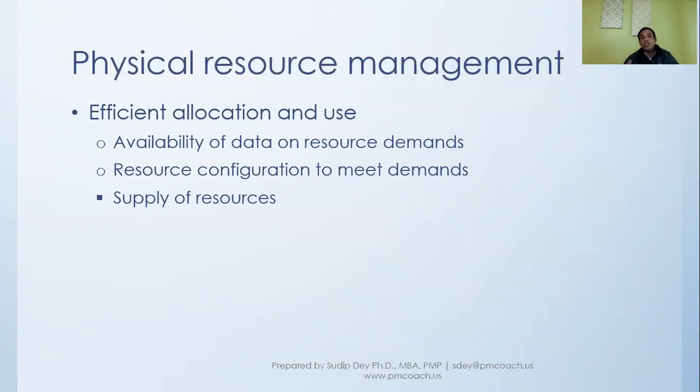And so as project manager, we are getting these physical resources. We want to plan it properly so that when it comes to testing, this environment is there for the test. Because if it isn't, then the project will get delayed, the project will suffer. So the resources should be available in time. And also in many other projects, like construction projects, we have to see that the quality of the material is right. If it's a low quality material, then again, the project will suffer. So physical resource is also an important aspect to consider.